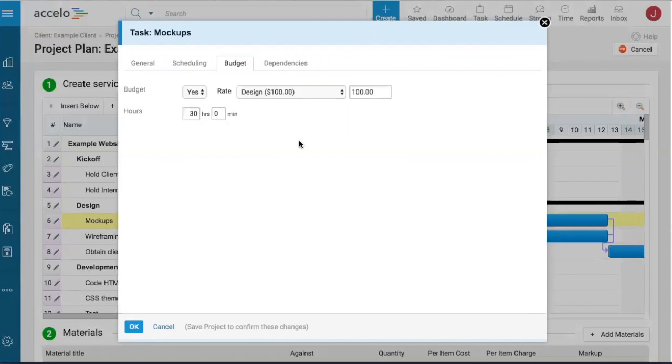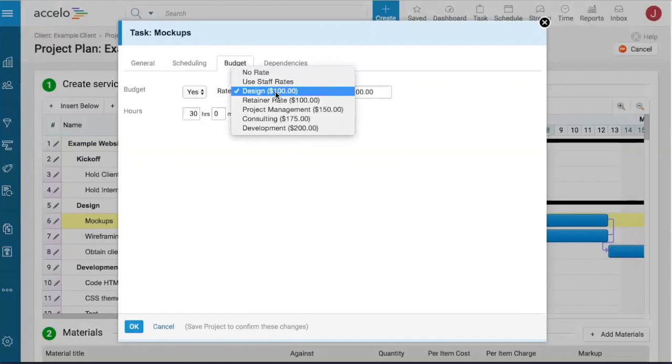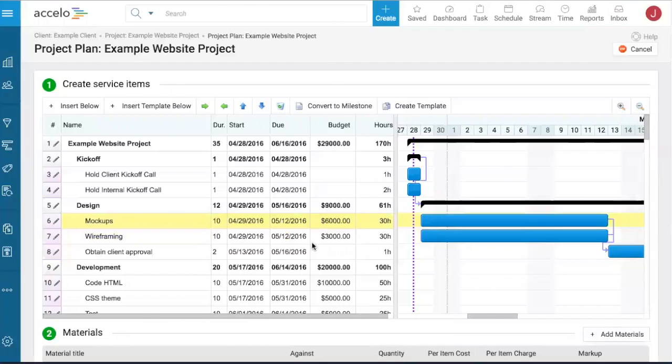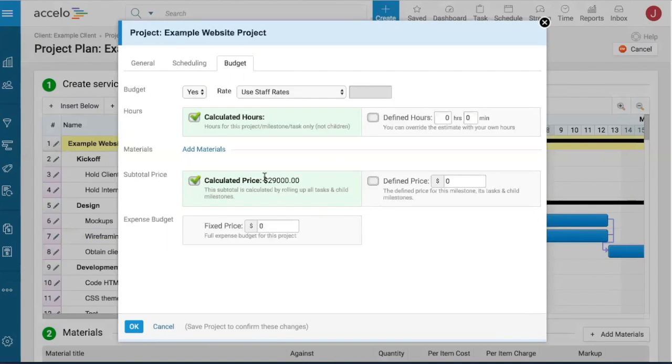What I'm also able to do on the project management side is define my rate structure, whether it be time and materials or just using rates to get an idea of a fixed bid. What you find is that the total just changed. Now, when I was saying the difference between time and materials and fixed bid, we can let you roll up all the pricing here, or you can say, all right, based on my normal billable rate at 29, I think that we can get 35K out of this. So you can go more of the fixed structure as well.